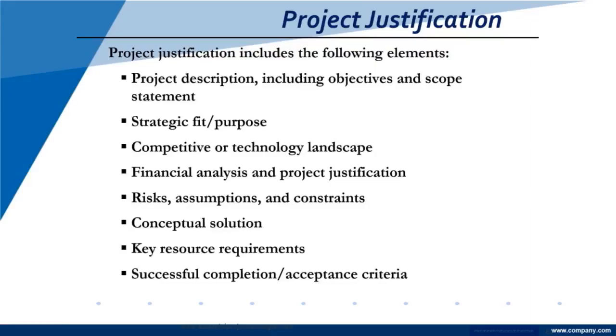Some projects, it's very distinct. Some projects, you have it really drawn out there. When the car rolls off the assembly line, you're done. Or when the customer buys the first phone, you're done. Or very concrete types of acceptance. When the customer gives me a sign off that I'm done, then I'm done. I have an acceptance criteria, and we should have an idea, even in our justification. How do we know what that success is? How do we know that this is acceptable?